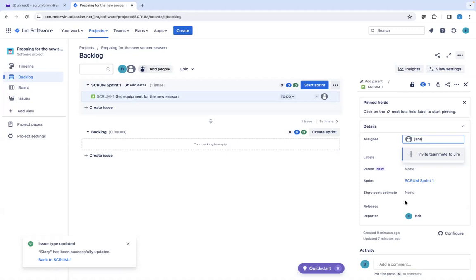Typically, a parent is just a higher level version of it. Thinking about my work examples, one of my teams works on direct indexing, and that's actually an initiative. Under direct indexing, we have a tax overlay, which is one of our epics. Then for the story level, we will say, as an advisor, when I do certain things within the tax overlay area, I should see certain options appear based on my role. So basically the parent is just breaking stuff down more granularly.